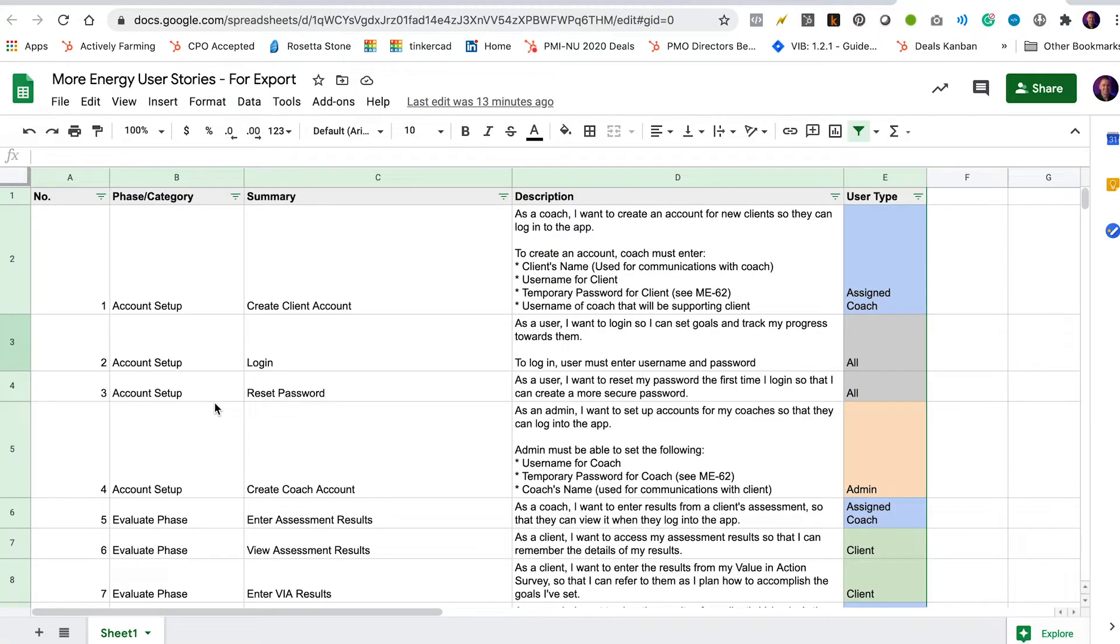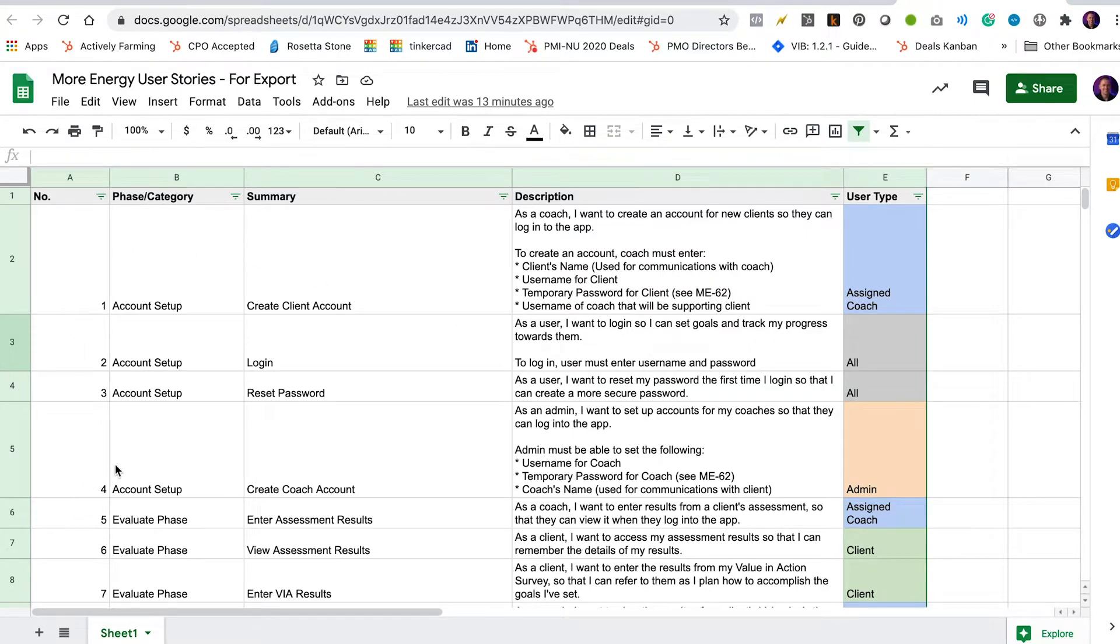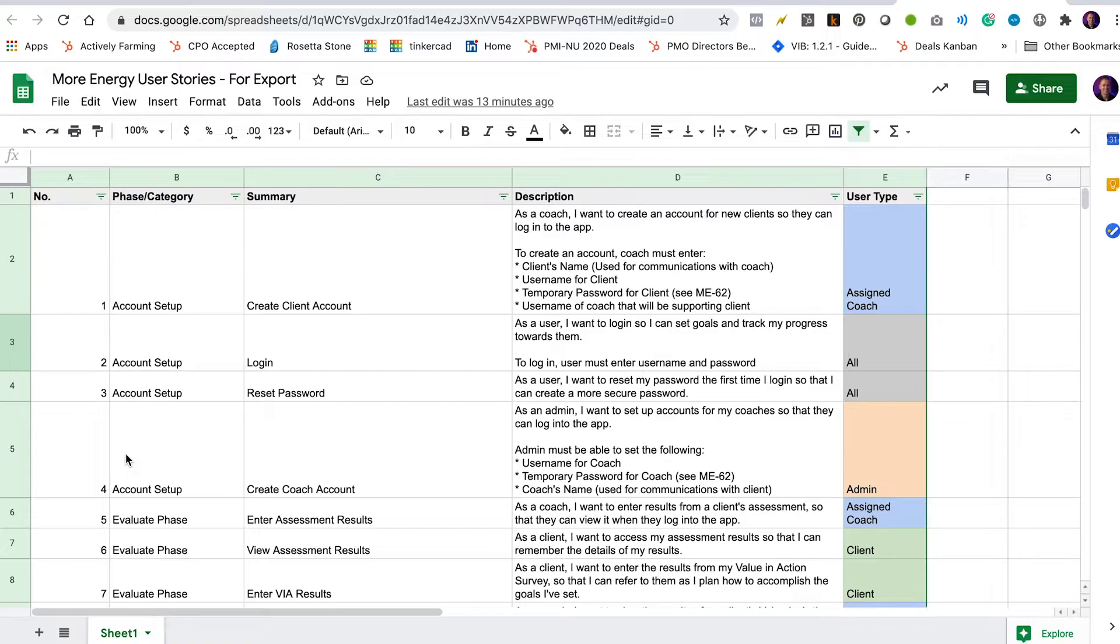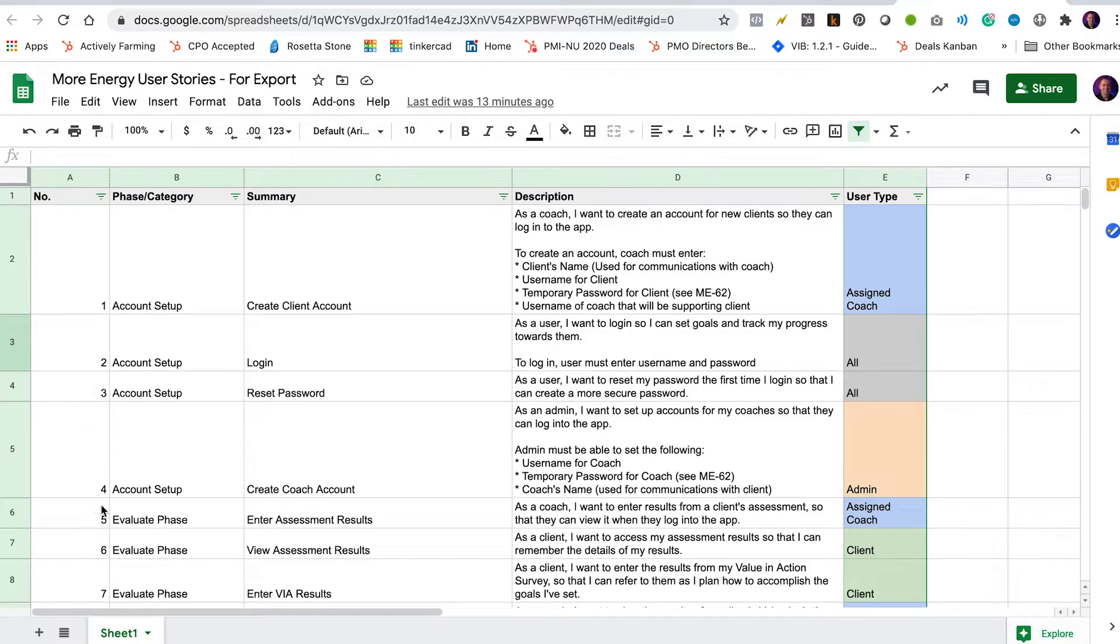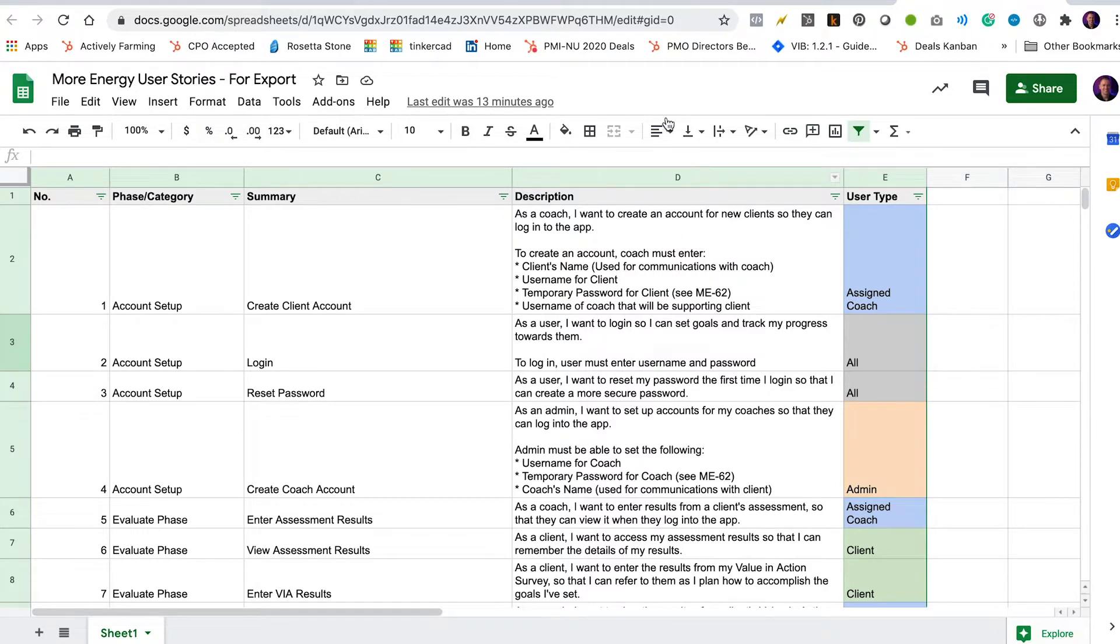Now, one thing that I've done is I have sorted these user stories in the order that I want them imported in because when you import issues into Jira, it'll just assign them a number, a unique identifier, as they are imported. So if you want to have the numbers in Jira match any kind of numbering in your source documentation, make sure that you're filtering or sorting your user stories in your source file according to the number system that you want reflected in Jira.